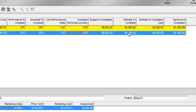My existing strategy for estimate to complete is based on the remaining cost of the activity. But there are other strategies that take into consideration existing schedule overruns and cost overruns.